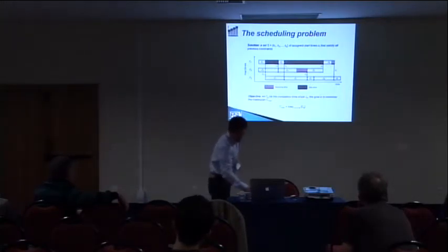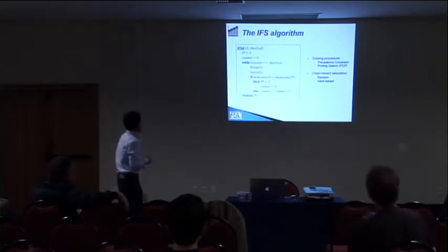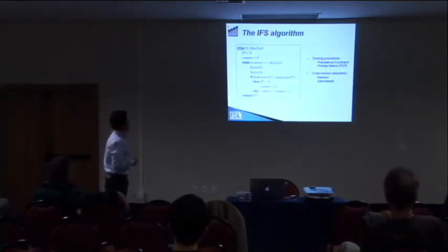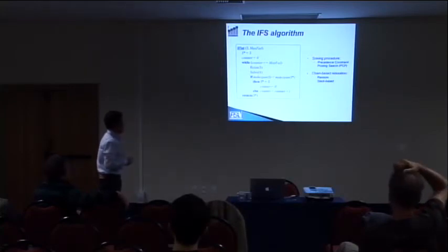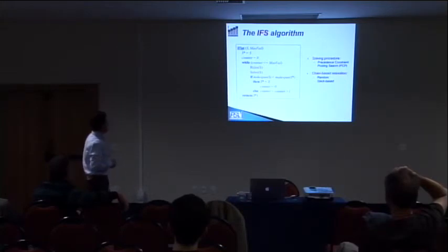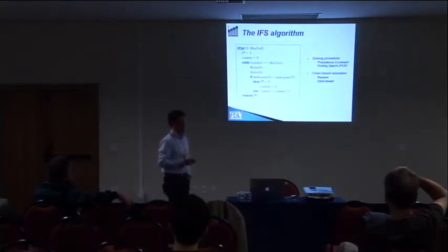The algorithm for solving this optimization problem is this metaheuristic. Basically, it gets as input a solution of the problem and a maximum number of steps, of attempts, and iteratively applies two steps, a relaxation step and a solving step. The relaxation step is a random relaxation.